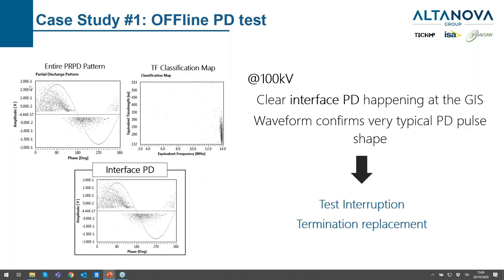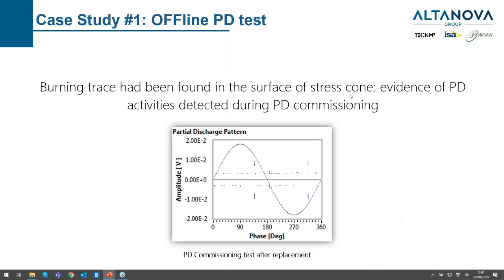At 100 kV, both the amplitude and repetition rate of the PD were even more evident. For the briefing: there was a PD in that termination. The test was interrupted and the GIS termination was replaced. Burning traces were found on the stress cone of the termination — it was confirmed PD activity.